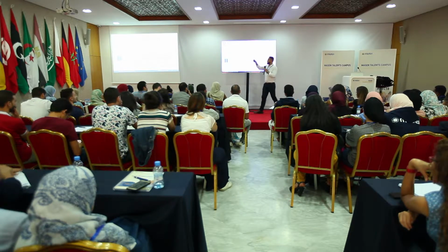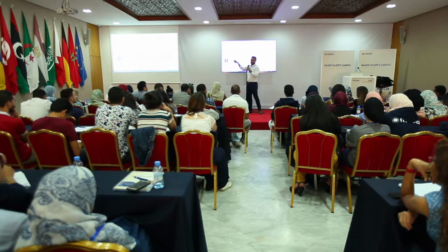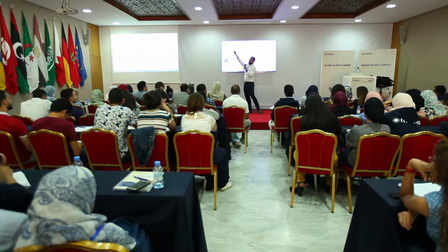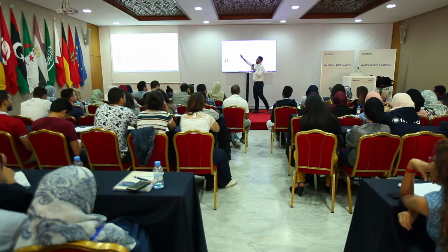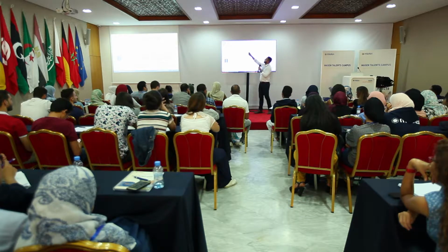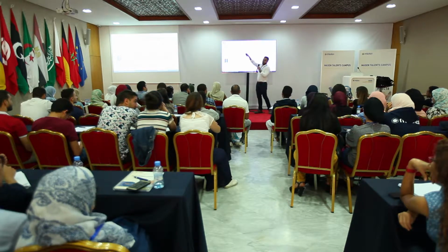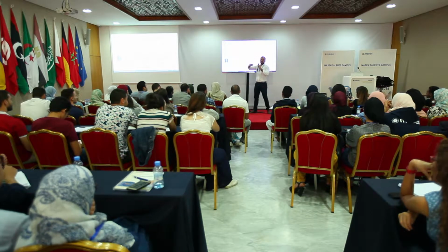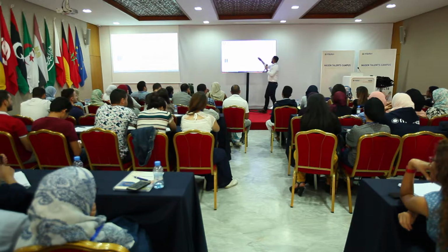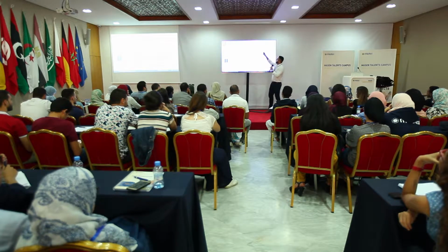After the plant has been constructed and proven to work as expected, they hand over the plant to the owners. And the owners could decide to operate the plant themselves or to subcontract an operator, which is another entity here. The operator makes money by making sure that the margin between what they get paid for operating and the cost of operation is increased. So they have their own purpose. They have their own business. And then the operation lifetime could be 25 years.